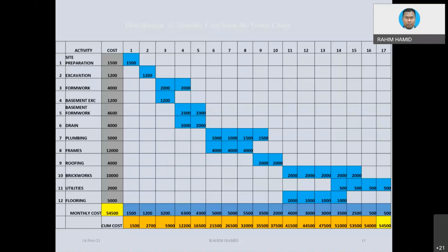If you do not have a long list of activities, then the S-curve doesn't look like an S. Sometimes people get confused. But if you have a long list of activities, then it basically will take some shape of the S, not exactly the S that we write down.